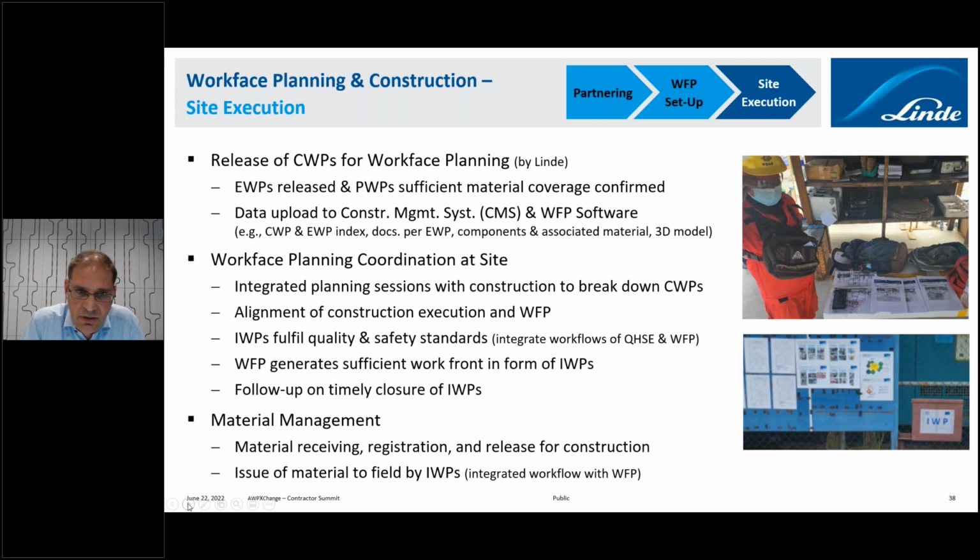Is there sufficient material coverage confirmed at the start point so that we can release the work package? But it's also about data update, upload to our CMS system and O3, which is basically the definitions of CWPs, EWPs, the documents per EWP, components and associated material, and 3D model.